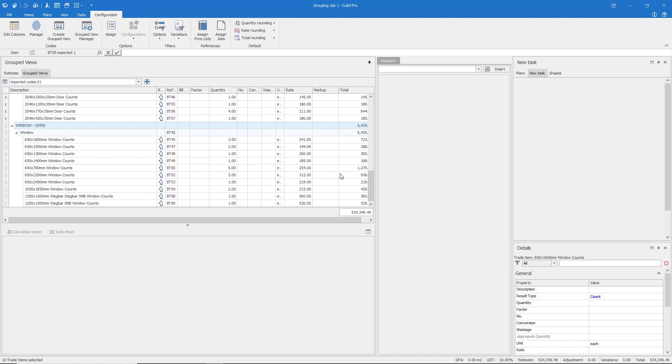Once again, coding can be utilised to reorganise existing data from an estimate, and this has multiple possibilities. In this example, I could have applied a coding structure at the rate sheet level, allowing me to group my estimate into supply and labour components. Alternatively, I could have coded my estimate based on time, indicating stages of the build for each of my trade items.